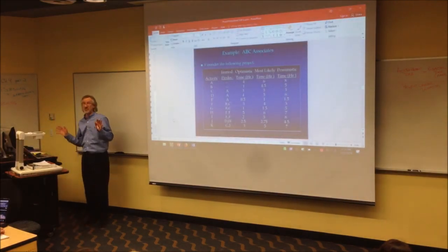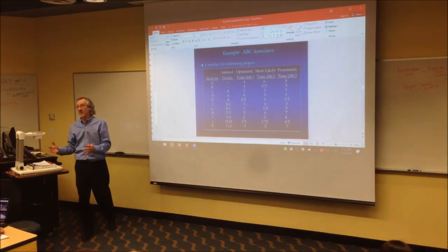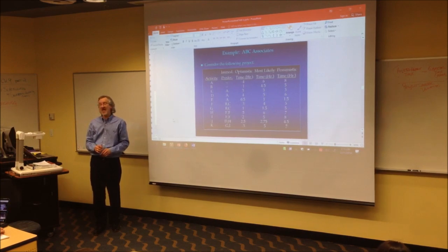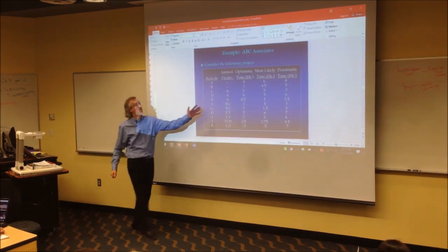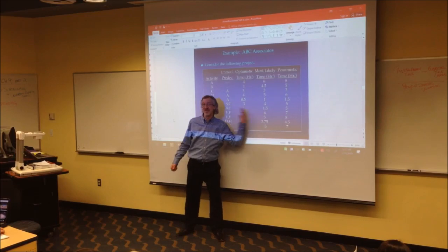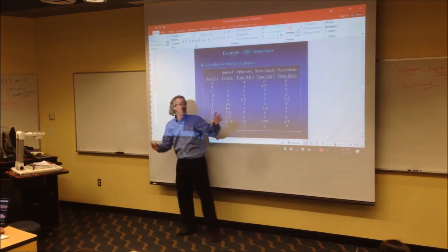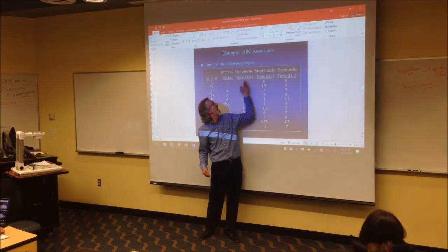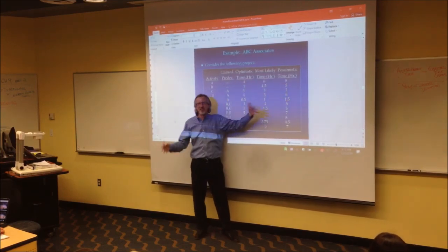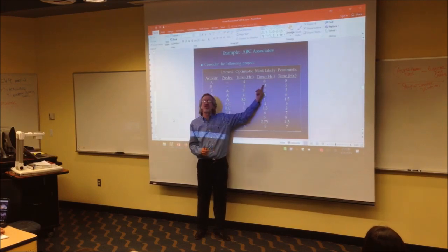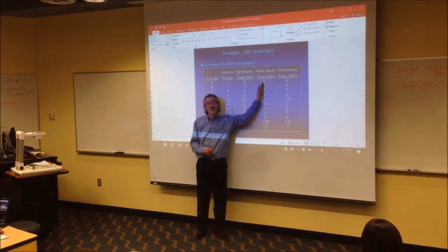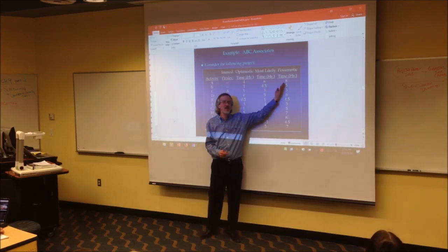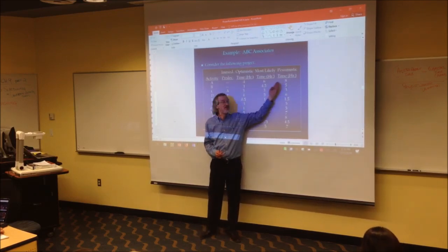I told you in most, when you're building a building, it's very easy to know exactly how much time it's going to take for the activities, but many activities are not building a building. And so you don't know for sure how long the activities are going to take. So you try to get a range of activities. You always have someone at the table who says, oh, no way is it going to get done in 4 hours. It's going to take 8 hours. And everybody debates, and then you go, well, we all agree it would be right around 6 hours. So that would be the most likely. Somebody swears they can get it done in 4. And somebody says, no way, if things don't work out right, it's going to take 8.